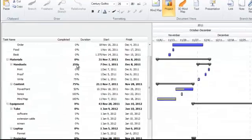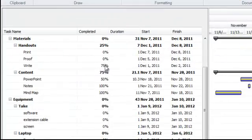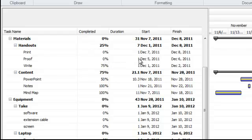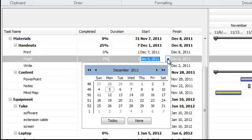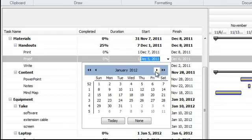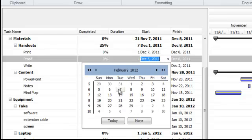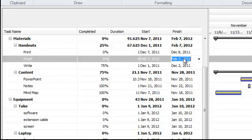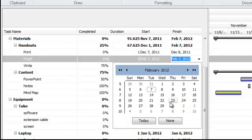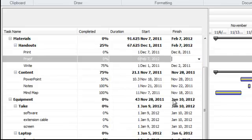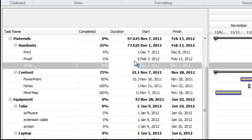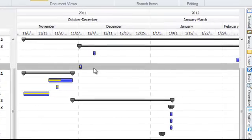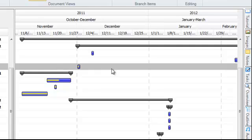You can set each of your tasks up by simply clicking on the start and end dates and you will find a small arrow which you can click on and you'll get your calendar appearing. So you can simply click on a start date and you can then click on a finish date and it will automatically populate the duration for you. You can change this duration manually if you would prefer by using your keyboard and typing in the duration number of days.